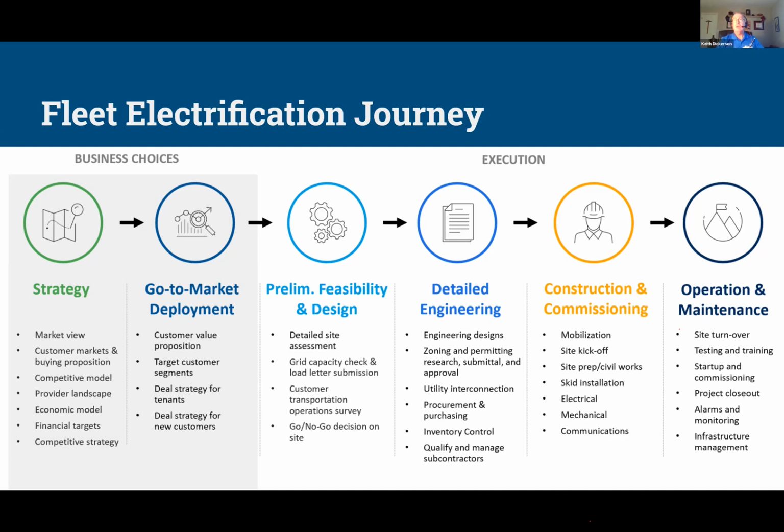On the same context, the permitting piece of it is very, very important, because each jurisdiction is going to be different. By virtue of us doing the Tesla Supercharger network and doing Electrify America and having relationships with utilities, we know how this works. We have a funny saying: if you've met one utility or one jurisdiction, you've met one. So understanding those local requirements, working with unions is a great piece of it, because after you go through the permitting and the utility coordination, you have done the detailed engineering, you're going to start doing the actual construction.